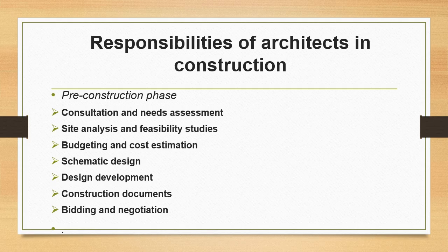Construction documents. The architect produces a comprehensive set of drawings and technical specifications that form the official instructions for the contractor. This package includes detailed architecture, structural, and system drawings required for bidding and obtaining building permits.